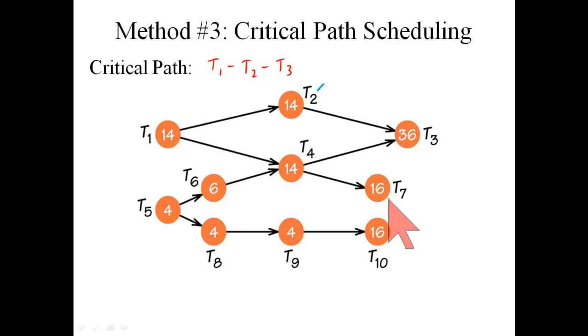All right, step 2 of the algorithm said the task then that's at the beginning of the critical path will be given highest priority when we get to the priority list. In other words, this is going into the priority list first now. And the algorithm says, okay, you've already chosen task 1 where it's going to go, so go ahead and delete it and any associated edges from the digraph.